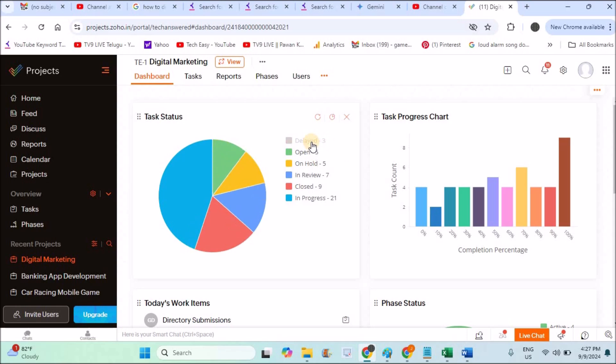Immediately I will concentrate on these delayed tasks. What are these delayed tasks and who are the owners of this task? I will send the team leaders to talk to the particular persons doing this task. What is the reason for the delay? The completion date is already over. They are behind. I will allocate more resources, maybe change the person and assign this task to someone else in the company, or assign some more people to the same task.